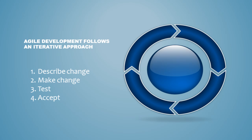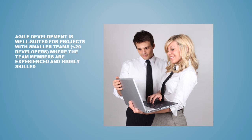They can also involve very thorough toll gate and documentation steps. Highly skilled teams are able to manage agile development more effectively due to many reasons. The reasons range from the ability to code more quickly to producing fewer defects. For larger projects with more junior developers and communication barriers that can be a result of organizational makeup or geography, a more process-driven approach might be necessary. Such processes might mean including formal toll gates or milestones, more elaborate documentation, and a more formal sign-off process by stakeholders.